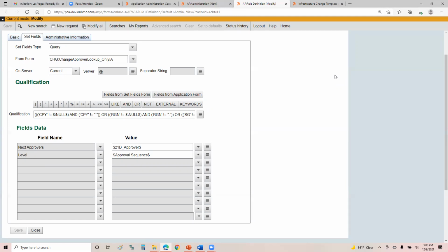Because I get that and they come up and say, I can't approve it, like you said. And that's just because BMC didn't merge the ad hoc into the change request to map to the stages in that capacity. So I run into that issue as well. So I always say, wait until you're ready to move it to the next level. Don't do an ad hoc at draft. Do it as a draft, hit the ad hoc, and then go to the next stage. So that way they can approve it at the request for authorization instead of at the draft stage.